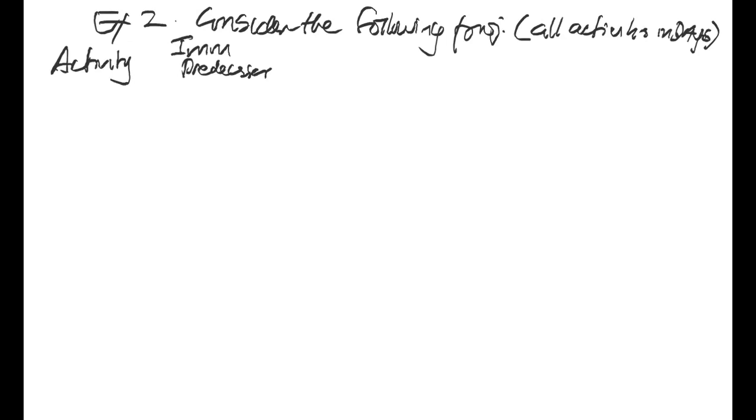For this work breakdown structure, you find that you're going to have three different times for each activity. You have the optimistic time, we call that A. We have the normal time or average time, we call that M, or the most likely time. So average, normal, most likely, that's M. Then we have the pessimistic time, and we call that B, all right?